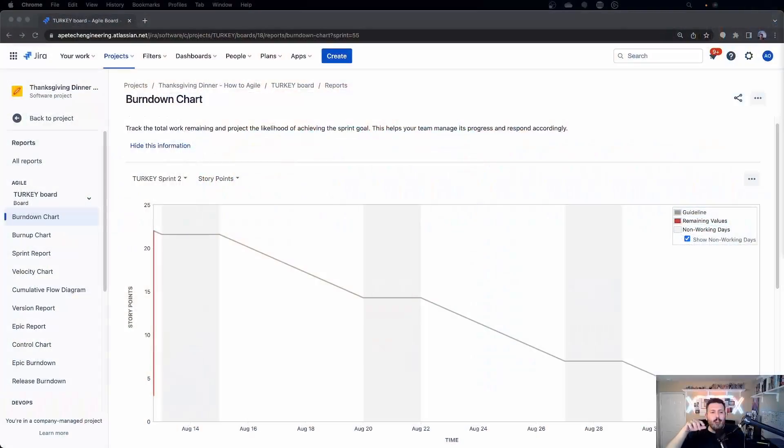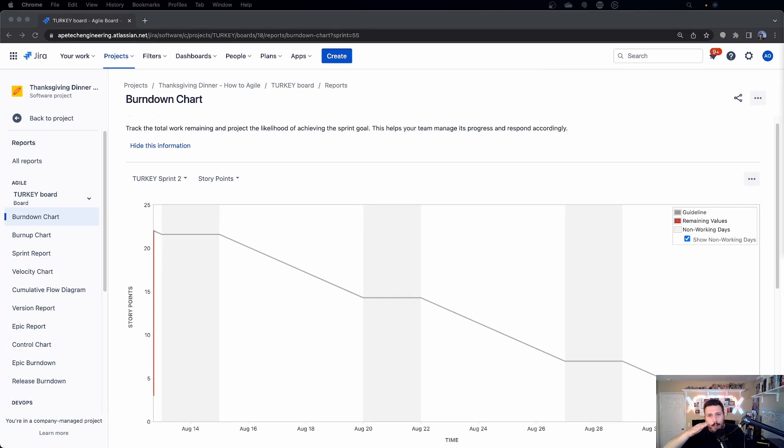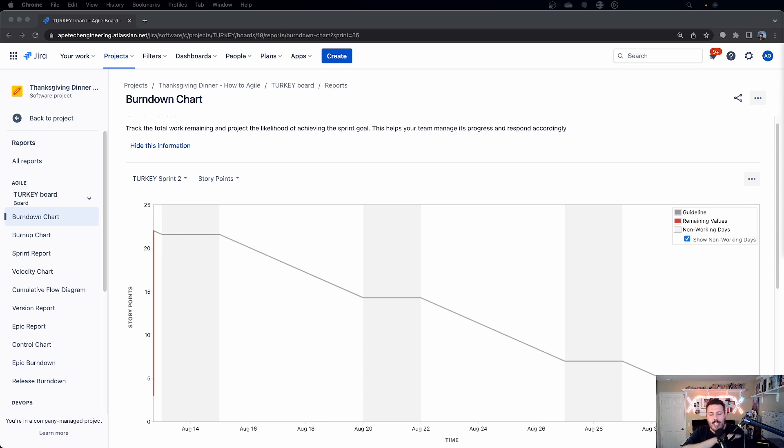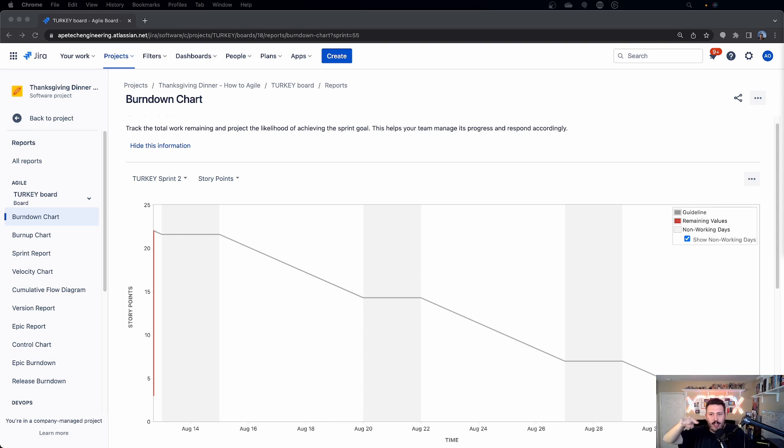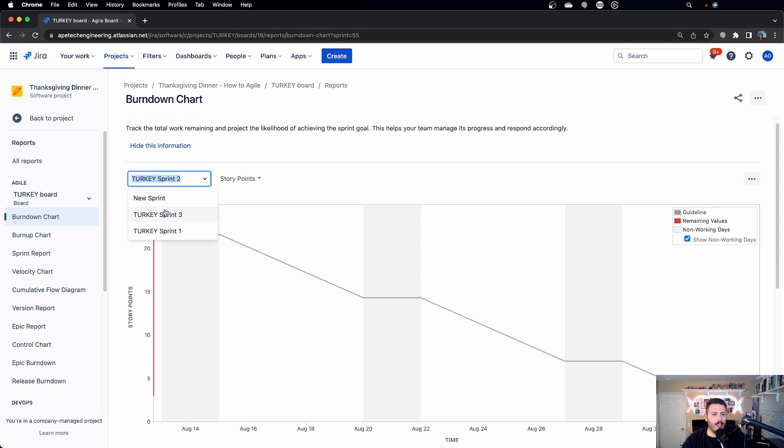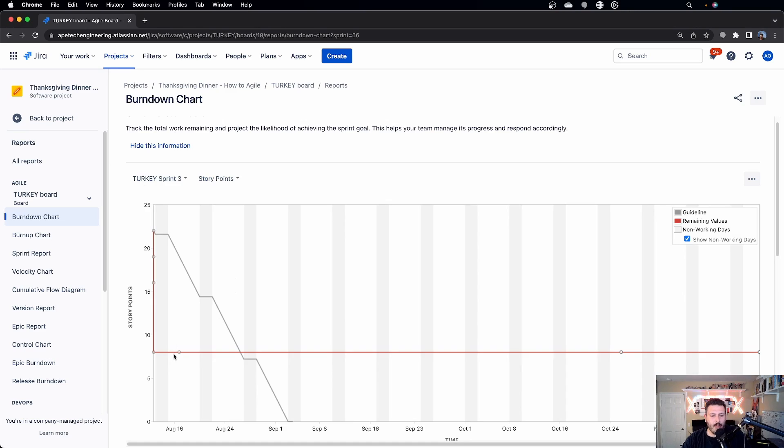And other things to look for, as you're looking at this chart is it's a burned down chart, right? You want to burn down. And so things that are huge red flags is if this burned down, if that red line is going flat, it's kind of just a flat line across. And you see this here and this is sprint three. If you see this phenomenon happening here, this is some really bad news because this is essentially telling you that your team is stagnant. They're not closing any work. They're not actually completing anything. And so this is a conversation that if you're a scrum master, you want to be having this conversation with your developers and finding out what's going on, why are things not being closed out?